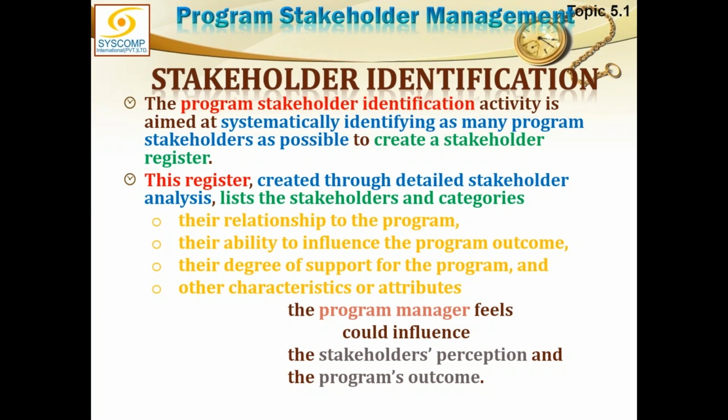Because we are talking about devising a strategy about a stakeholder, it is recommended that this should be recorded into a separate document, which should be the stakeholder strategy document. So your strategy about that stakeholder, as we have the risk response, similarly, is the behavior we want to maintain with each of the stakeholders. This is recorded separately. The only reason I am not putting it into the register is because the register is a public document.